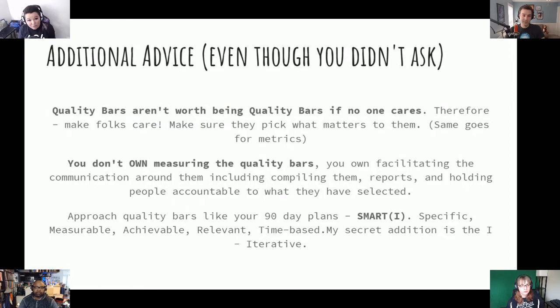Also, it's important that they're iterative because you need to understand if you're not going to hit those goals. Like if 60 frames per second is never going to be a possibility, let's start to figure it out through normalizing quality goals now. And then we can help facilitate the tough conversation. We're pointing out that risk. Ariel made a great point, she wants to be a risk manager. It's a really real thing. You can start to have those important conversations if we know that we're failing or at risk of not achieving those things. That's also not saying that we can't ever hit 60 frames, but maybe just not right now. We pocket that and let's go for 30. Let's try to hit 30 as a baseline consistently and achieve that. Then we can push for 60.